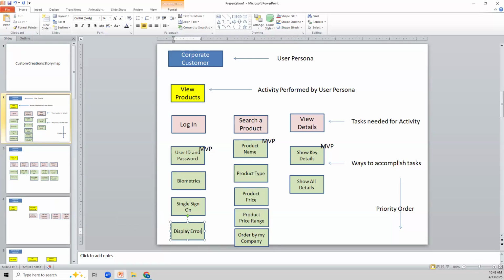Any questions? Dilip, when you mentioned Agile, story mapping and the Agile cycle, will this be the same if the company had some other system in place, like waterfall or another methodology? If it is waterfall or another methodology, you draw the process maps, and then you take that process map and start building a document that lists all of the requirements in one place.